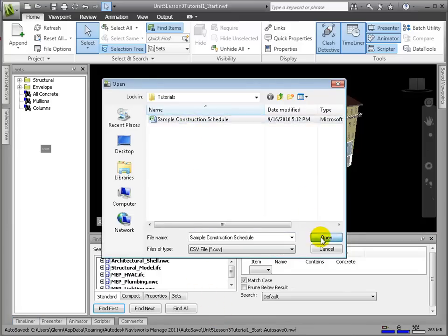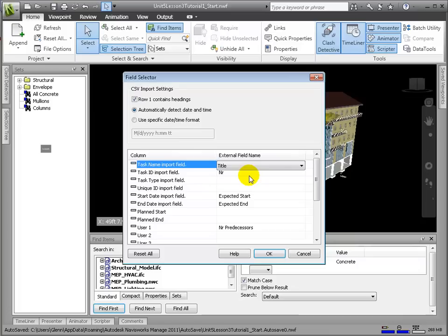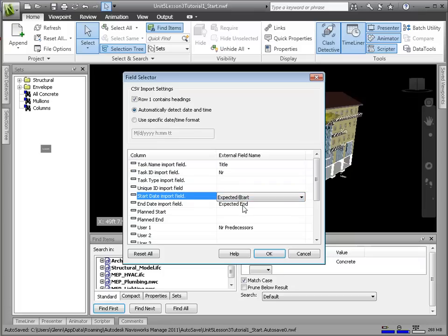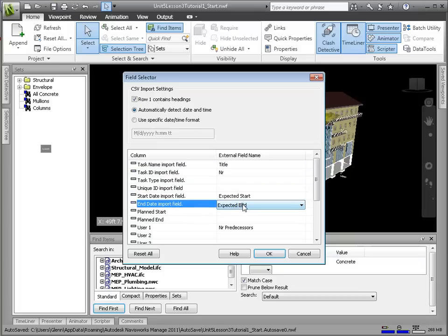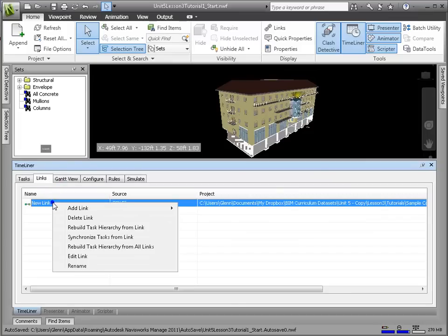Navigate to our schedule file, and a field selector dialog appears, asking us to map the columns of our schedule properly to the Timeliner columns. Timeliner correctly interpreted our fields, most importantly title and start and end dates. We can also choose to import another field, but for our purposes now, this is enough.